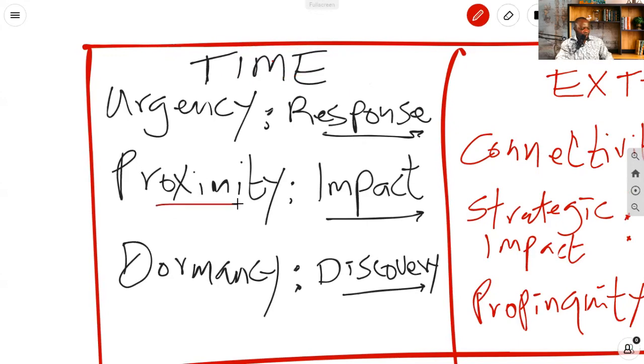In the same token, we can say proximity is all about the time factor before the risk may have an impact on one or more project objectives. So it's the time before there's an impact on the project's objectives. And last but not least, dormancy. Again, it's time before the risk impact is discovered. The period of time that may elapse after a risk has occurred before its impact is discovered. A short period indicates low dormancy.